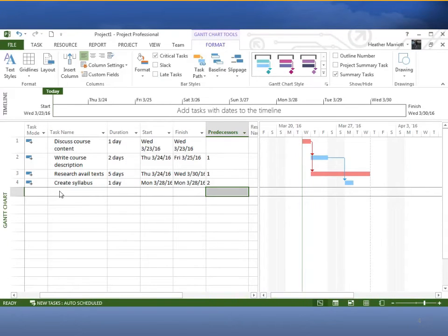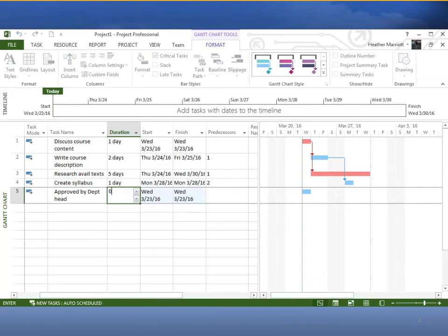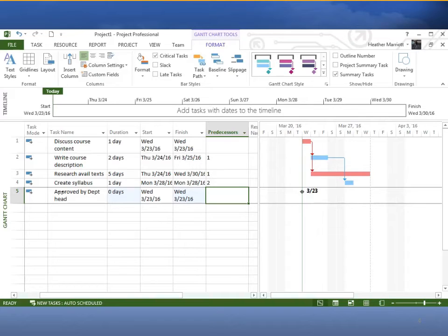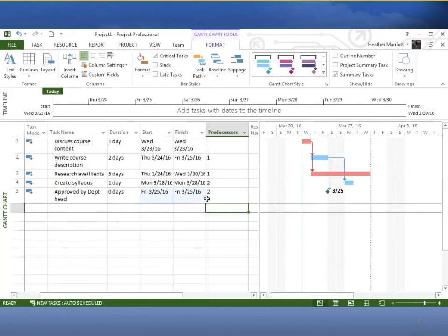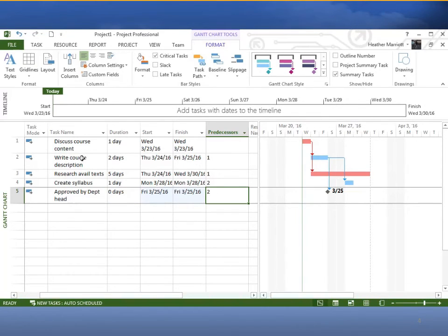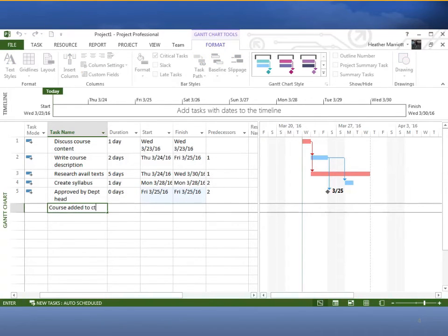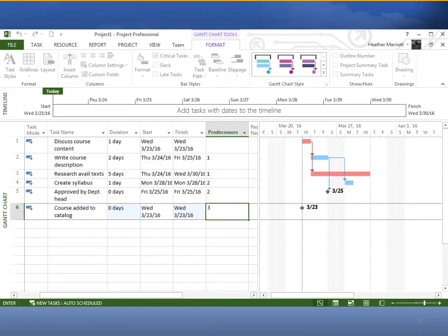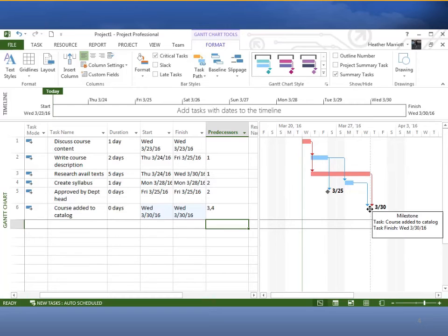When I said our first milestone was approved by department heads, I said that had to have a zero duration and it had the requirement that it was done after task two. When I say after task two, I mean there's a relationship, a predecessor and successor relationship. So the predecessor would be task two, write course description, and the successor would be approved by department heads. The next milestone was course added to catalog, and that had two predecessors, both tasks three and four. We can just put a comma in between those predecessors, and we can see arrows coming from two different bars going down to that milestone added to course content.